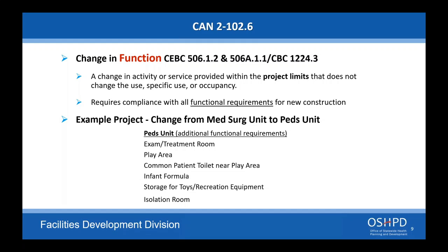Well, if it's failed, I'd definitely be contacting your compliance officer or RCO to talk about it, because it's probably going to be an emergency project. Which item is this? Okay, I see it. Yes, structurally, you do need to anchor it and it has to be secure. If you're replacing the unit and there are different requirements, those requirements are going to need to be met.